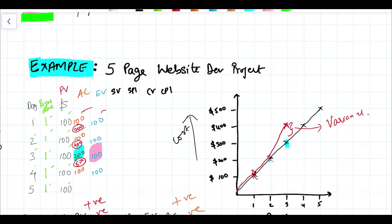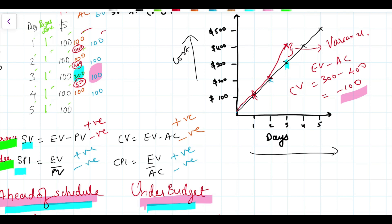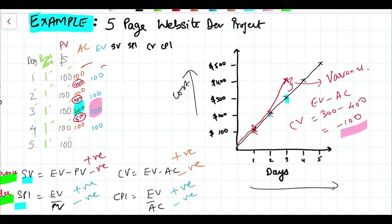Cost variance = earned value minus actual cost = $300 minus $400 = negative $100. Since the cost variance is negative, the project is over budget. The actual cost has exceeded the earned value, so you have a cost problem and need to act.